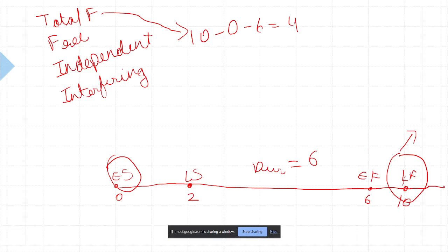So what is happening is that when you talk about total float, if you delay your activity by 4 days, you will be starting at 4 and finishing at 10. Now the rest of the activities cannot delay, because if this is the late finish for someone, it would be the late start for its successor activity, right?